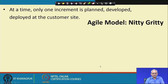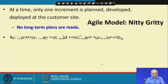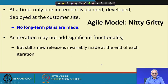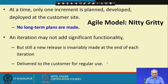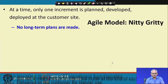In this incremental model, focus is on one increment at a time — no long-term plans are made. Each iteration may add even a small amount of code as minor increments, but after a time-box an increment is made and deployed at the customer site. Sometimes the incremental feature may be very small, but these are still deployed for regular use by the customer.